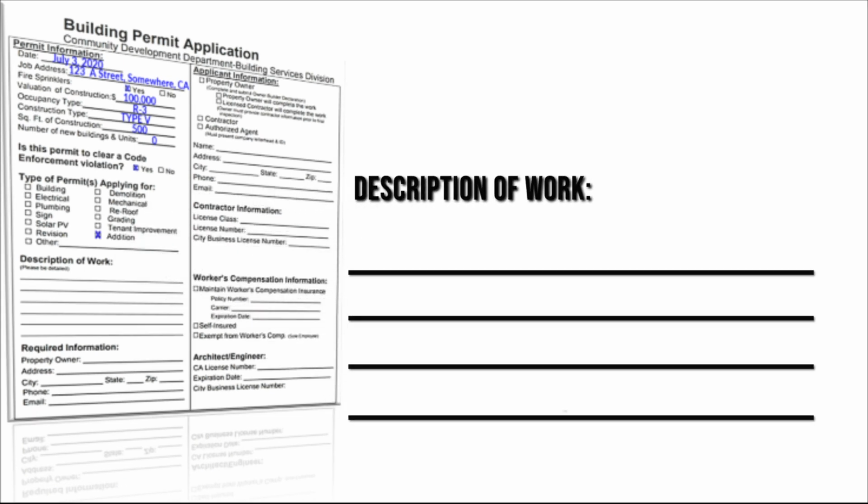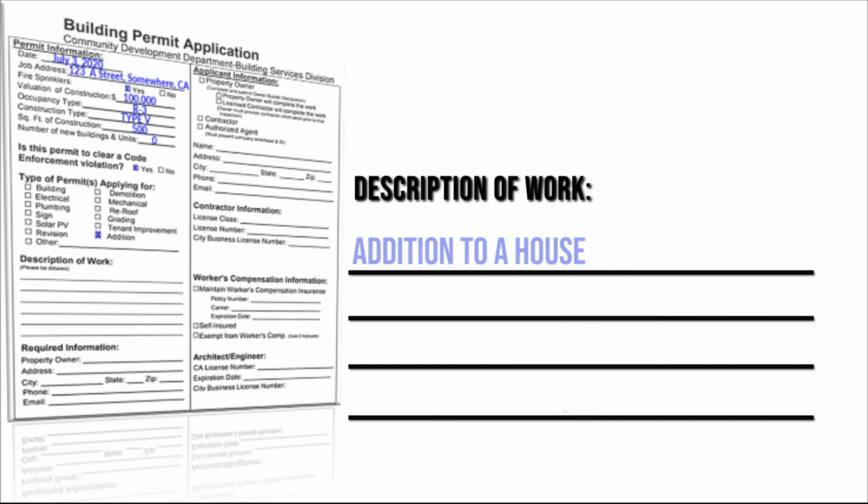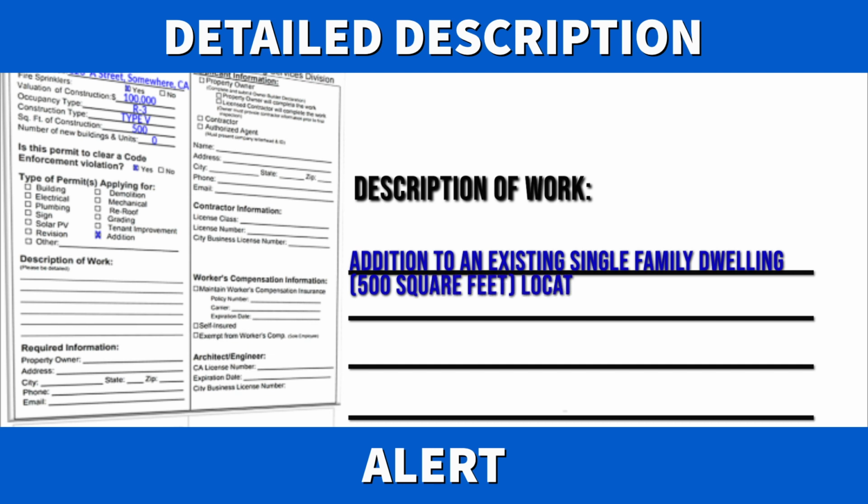And now to one of the most important parts of the building permit application, the description of work. Considering the building permit, hence the description of work, is subject to public information, if the building permit is submitted and issued under a vague description of work, it can create project setbacks during the inspections, and the permitted work can come into question if the property were to sell. On a future video, I will review the Public Records Act as it relates to building permits, so stay tuned.